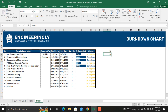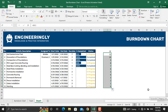This means that on the start date the number of remaining activities will be 11, on the next date it will be 10, and finally on 13th April 2022 it will be 0 since the last activity will be completed. This represents our planned values.